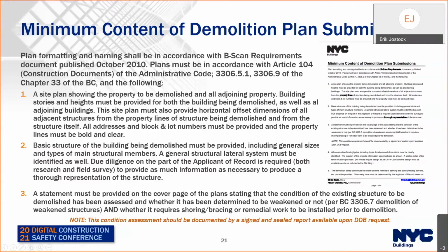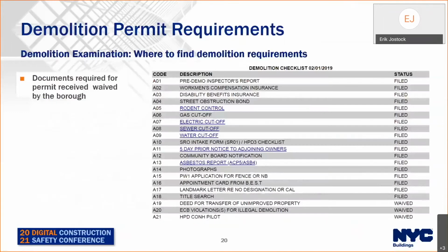Okay, this is a list of permit requirements to be submitted to the borough for your DM permit. Note that plans are not on this list because some demolition applications are exempt from plan submittal requirements, and these applications may be filed by the GC or building owner. Licensed professionals are not required to file some DM jobs.